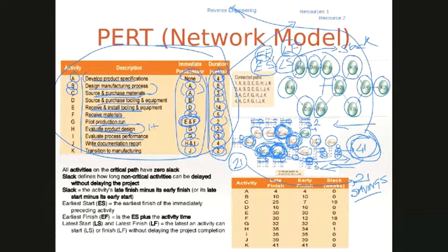Because if you take a longer time, then it creates a problem, right? So without cluttering the place any further, let's look at this table. You've got all these activities. It's basically saying this is the latest finish for each. This is your earliest finish for each. The difference between late finish and early finish is something called slack. This slack is your savings, mainly because you don't want to use up a resource if it's not needed.